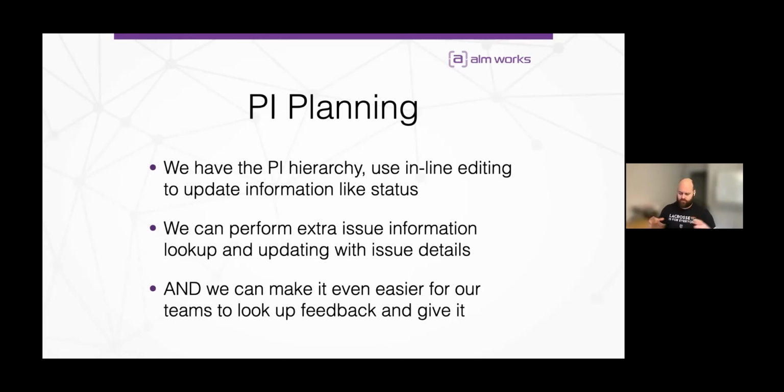And so it's a great way for businesses to tell teams, hey, these are our priorities, these are our strategic objectives. Is this a realistic plan? And you get feedback in a concentrated way, like, this is the only thing we're doing here. And then you can set up what's called a program board. And you can then see, hey, we are now all committing to this particular outcome at the end of this quarter.